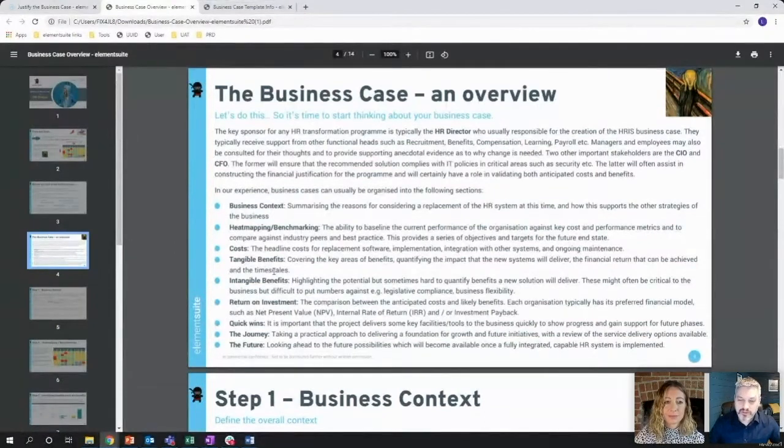That's not to say you should never listen to those things or never try to achieve those things, because if they're going to be valuable for that individual, they're probably going to be valuable for the business. So if it stacks up, you can always bring more things into scope through what we call change control. But having an initial set of scope that your budget is attached to and everything else is really, really important.